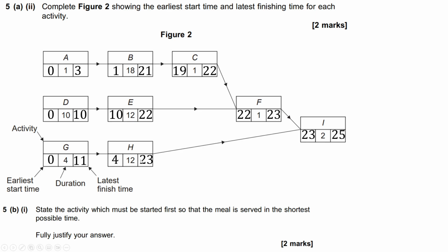You wouldn't have held it back at all actually, because these all have wiggle room, right? This one can start at the 11th minute, not just the 4th. So that's 11 take away 4, so that's 6 minutes of wiggle room. This one is 7 minutes of wiggle room. That's tons of wiggle room.